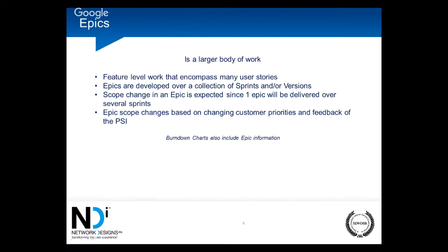So can a theme. But the theme can be grouped by actor, product feature, and issue resolution, where an epic is really developed around a feature. So you would have user or customer login as an epic. We could call it the customer dashboard, for example, and that would handle them logging in, them seeing their orders, them canceling an order, them adjusting their payments, adjusting their address book with their shipping address, billing address, a friend's address if they're sending stuff to a buddy, or flowers to your wife. So all of those, that's epics. The stuff is feature based.